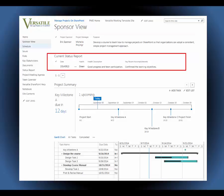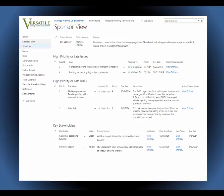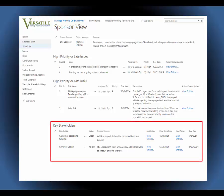The project manager doesn't prepare a sponsor report. The status report was already created during the team meeting. And the schedule shows only the tasks and milestones that the sponsor cares about. Now, scroll down. The sponsor is looking at only high priority or late issues and risks. The sponsor view is a concise update of the overall status, the schedule, issues, risks, and the key stakeholders. Yes, we've applied the same structure to monitoring communication with key stakeholders that we apply to issues and risks.